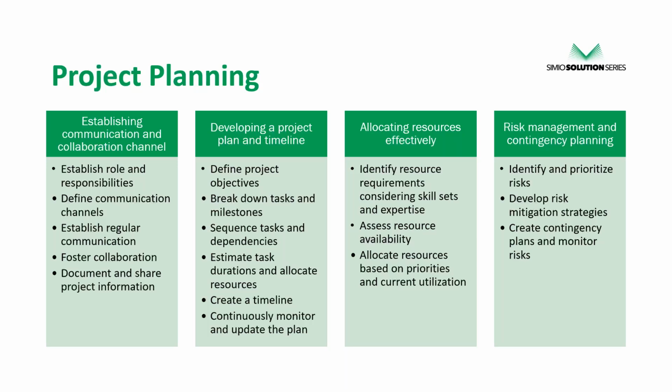And then you start to put all of that information into a plan once you have estimated times for each of those tasks. And the estimated times can be really tricky, right? Especially if you don't have a lot of experience doing the activity that you're estimating time for. I always err on the side of, it's going to take longer than I think it is. I tend to always underquote time in projects, especially around data, like I mentioned earlier. It tends to take longer than I expect it to.